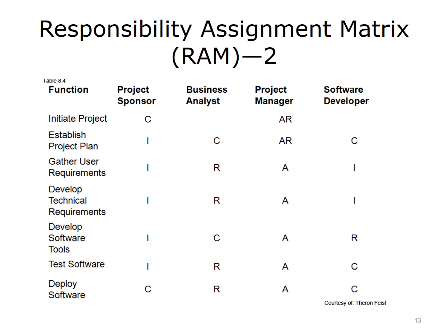When the same role is both responsible and accountable for a task, the matrix shows only the role that is accountable. Except for this instance, each task-role combination should be assigned one letter or participation type. Assigning multiple participation types can confuse team members and lead to delays.